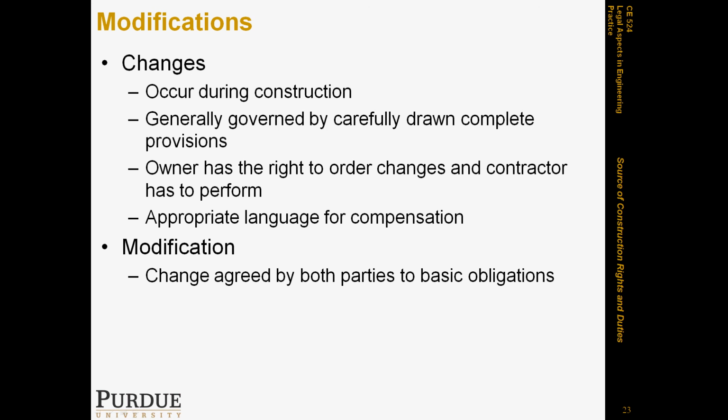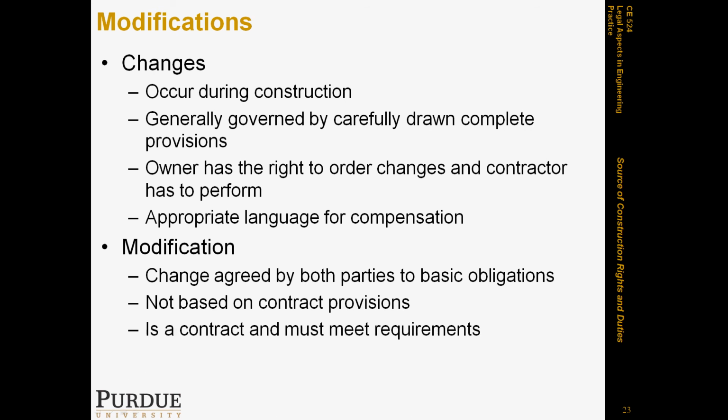And of course, as a result, it's not based on any contract provisions that exist, and it is in itself a contract and must meet the requirements for a contract to be created, which includes certainty of terms, offer and acceptance, or basically mutual assent, and consideration.